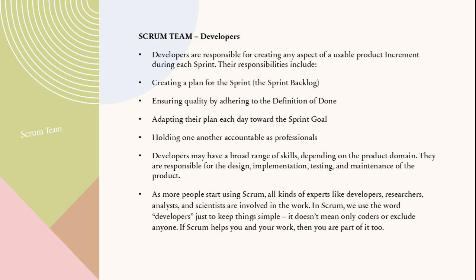Developers are the hands-on builders, responsible for creating a usable increment each sprint. Their main duties are planning the sprint, sprint backlog, ensuring quality via the definition of done, adapting daily to stay aligned with the sprint goal, holding each other accountable. Developers in Scrum includes everyone involved in building the increment: coders, testers, designers, analysts, researchers, and more. It's about delivering value, not just coding.